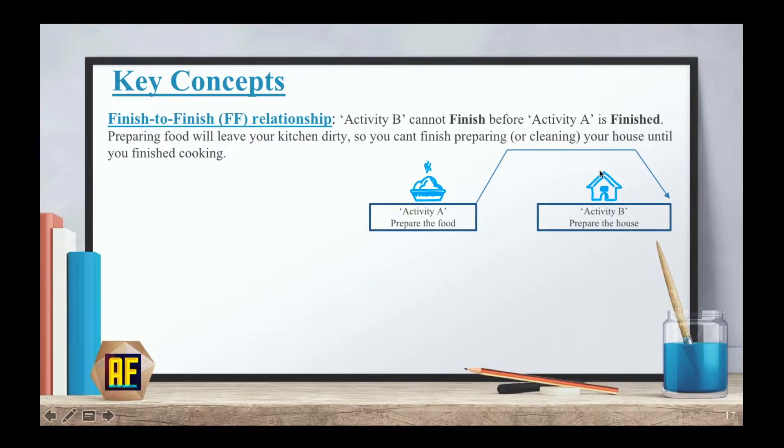Finish to finish relationship. Activity B cannot finish before activity A is finished. Preparing the food will leave your kitchen dirty, so you can't finish preparing or cleaning your house until you actually finished cooking. I know it kind of makes sense and these are simple examples, but when you have a big construction project with a lot of subcontractors working on site, you need to see which one comes before the other and which one can overlap without having issues.